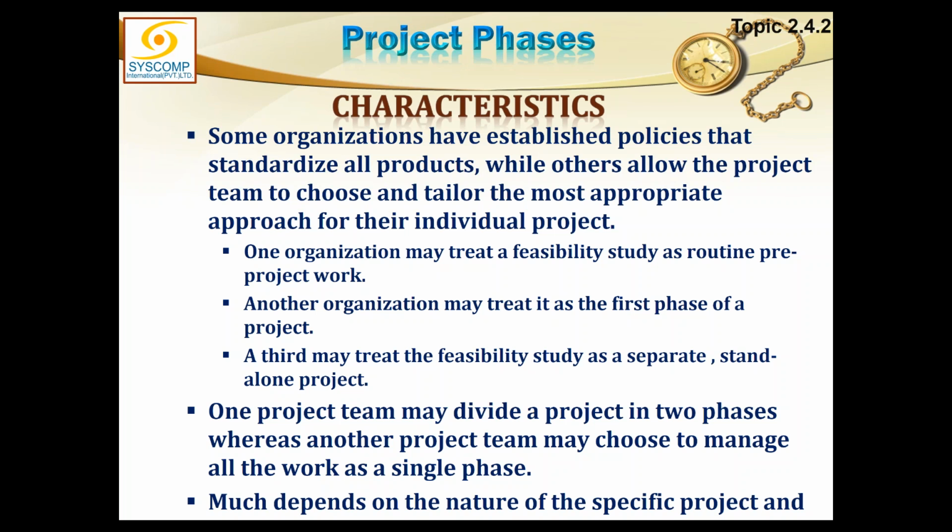Got it or not? So this much work till we reach here, all the plumbing work, electrical and everything must have their deliverables ready till this point. As if this is a gateway, we can check it out and clear it from phase 1. Then we allow it to enter into phase 2. Like, you complete one story of a multi-story building. You complete one story and then give approval of that story that all the works have completed. And then you are allowed to move to the next floor.